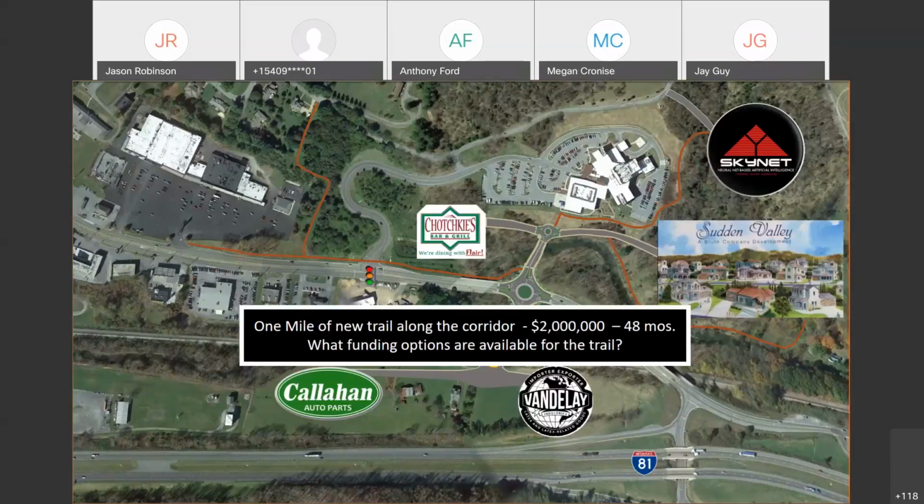And then a couple of folks went after the recreational access. So with the rec access program, there has to be a designated recreational facility that's approved by the Department of Conservation and Recreation at the state level. If there was a recreational facility designated as such in this area, certainly could go after those rec access funds. The rec access program is relatively small, so there might be a piece of this that could tie in if there was a facility. We haven't specifically laid out a facility in this area, but if one was built, there could be some of that.